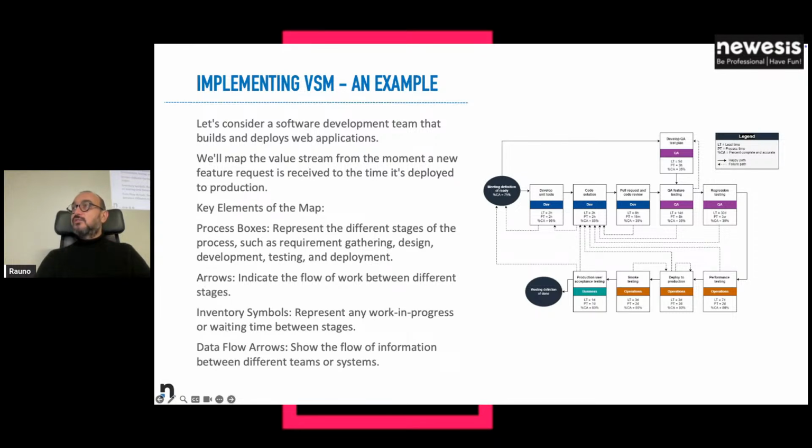And there's also 35% complete and accurate, which means things that are really passing what is going there. That is very low. If we look after, we can see that deployed to production has a lead time of 3 days and has 80% complete and accurate.